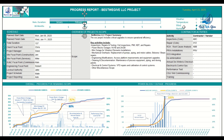Coming down further on the right-hand side, you can see the weather conditions section — temperature, wind, and humidity. If your project is impacted by seasonal or weather conditions, you can always come and put in whether it's sunny, rainy, or cloudy, whether the temperature, wind speed, or humidity is high or low. These parameters show how weather conditions look for your project, helping explain delays due to rain or snow.